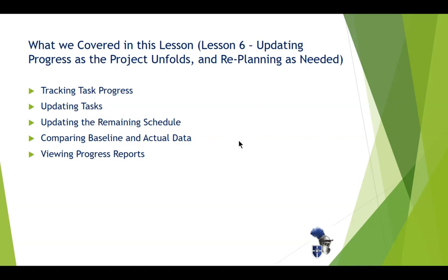We also saw the various reports that we can cut out of the schedule once there is data to be tracked. If you're going to experiment with some of this, make sure that you have a schedule which has resources assigned, those resources have costs, and that a baseline is set. Change a couple of things to durations after you set the baseline. Set a status date, and then start setting progress for some tasks to what it should be and some to what it was not expected to be against that status date. That way, you can try the various permutations of what we did. And when you do look at the reports, you'll see meaningful information on them.